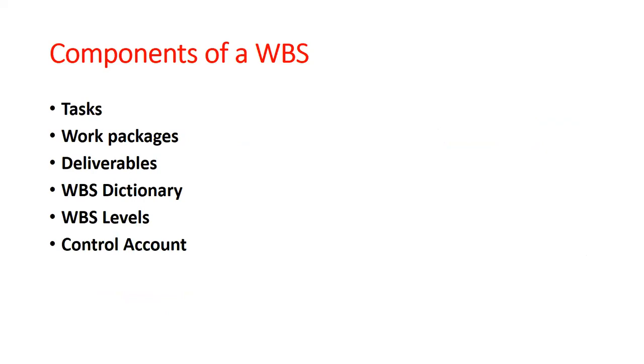Now, some of the things here might be silent when you're creating a WBS. Some will come out very obvious, some will be silent. Not completely silent, but we don't create columns for them. For instance, if you're creating a WBS, primarily, you will see your control account first, or your code of account, where you see 1, 1.1, 1.2, that's defining the levels.